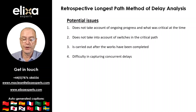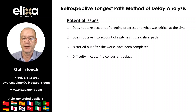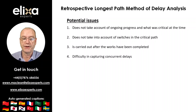A further consequence of not identifying the actual or contemporaneous critical path at the time is that the method can struggle to deal with concurrency, where multiple events are causing critical delay to completion at the same time. As such, it might not effectively differentiate between the various delay events happening concurrently.